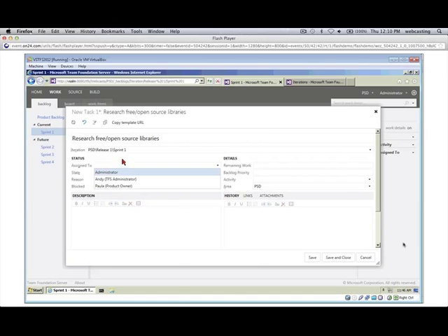And first of all, I hate the term assigned, not owned by or not in anybody's particular queue of work. Because if you think about it as a task board, you walk up and you see what stickies are left, and you can just pull one down that needs to be done. So I also don't like this activity drop-down. I talk about this in the book as well. Deployment, design, development, testing, requirements. I understand that you can use this tool to start to capacity plan by activity level so that you can see, we need more testers or we need more designers. But remember, we don't use those terms in Scrum.